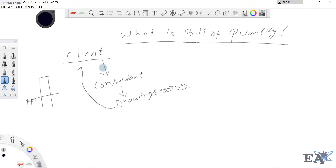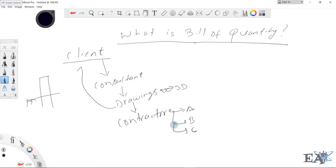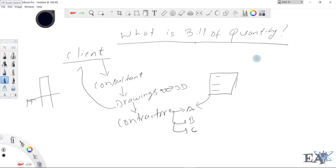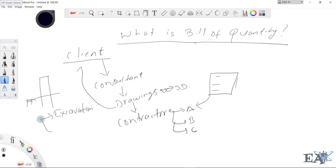Now you need to hire a contractor to do your work. Suppose we have three contractors: Contractor A, Contractor B, and Contractor C. The consultant and client give each contractor a piece of paper that contains all the quantities involved during construction. For example, while building this pillar, the contractor needs to deal with: site clearance, excavation.